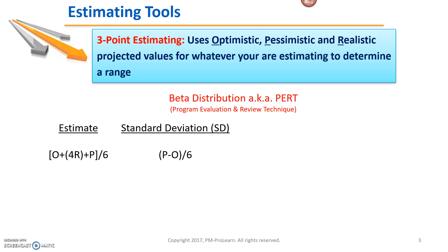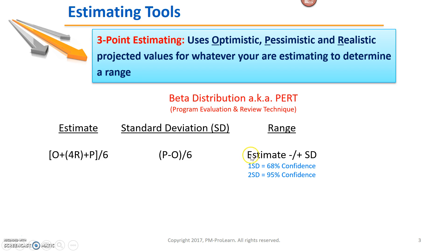The second step in coming up with a range is to figure out the standard deviation. This is a statistical term, but you don't need to get deep into the weeds — you're trying to pass a PMP exam, not become a statistician. Just know the formula: pessimistic minus optimistic divided by six gives you the standard deviation. Once you know that, you can take your three-point estimate and subtract and add one standard deviation to come up with a 68% confidence level, or two standard deviations to come up with a 95% confidence level.